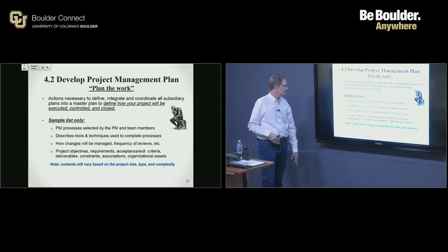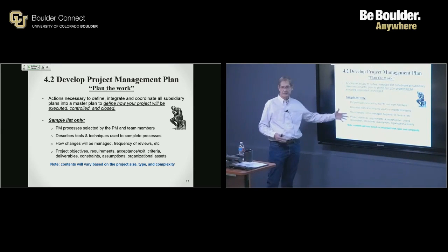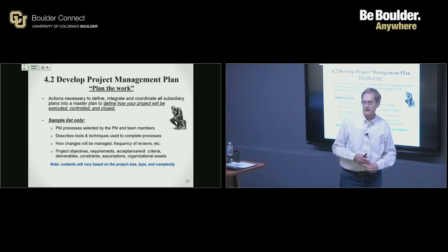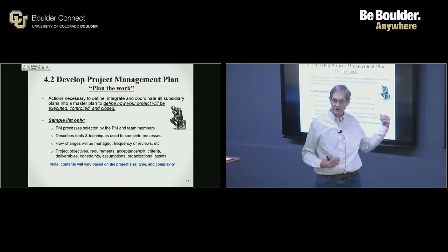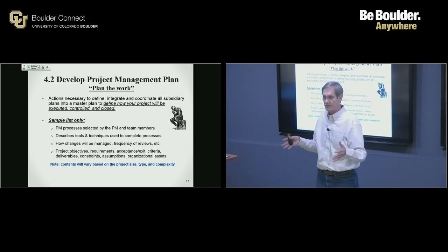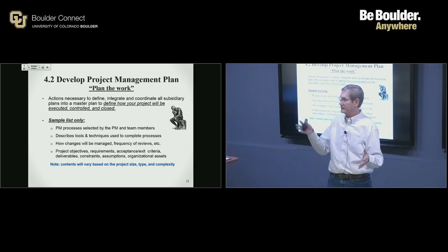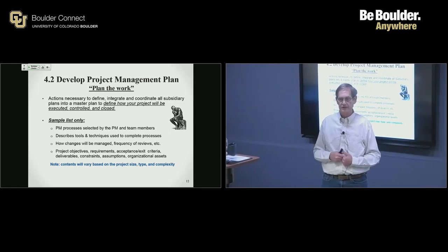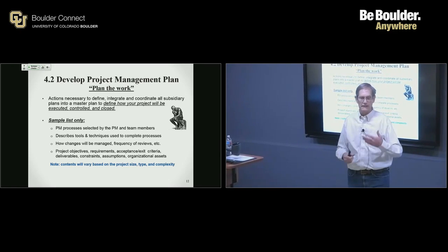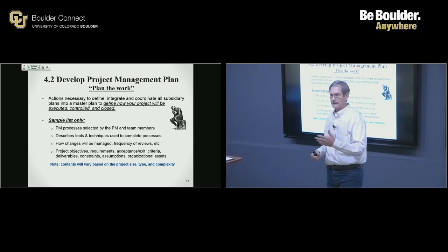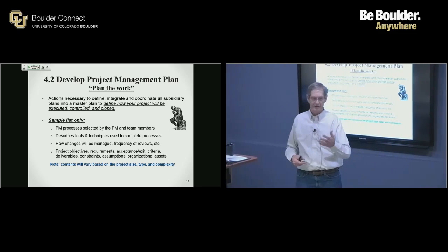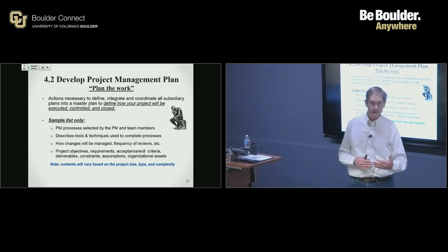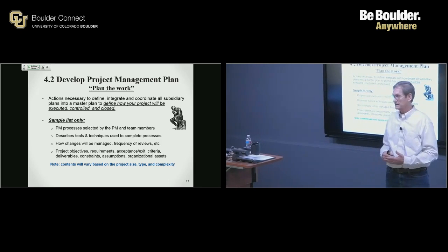So here's a sample list of things that you might see as far as tools and techniques. I made a really poor decision on a very large project, Procter & Gamble, many years ago. My decision as far as the tools, we were developing the project management plan, and I said, scheduling, very important. Let's use Microsoft Project. Several people on the team said, yeah, it's a great tool. It makes sense. Let's do it. By making that decision, I unwittingly found that it was a huge cost to the project. Licenses for Microsoft Project at the time were $1,000 a pop.